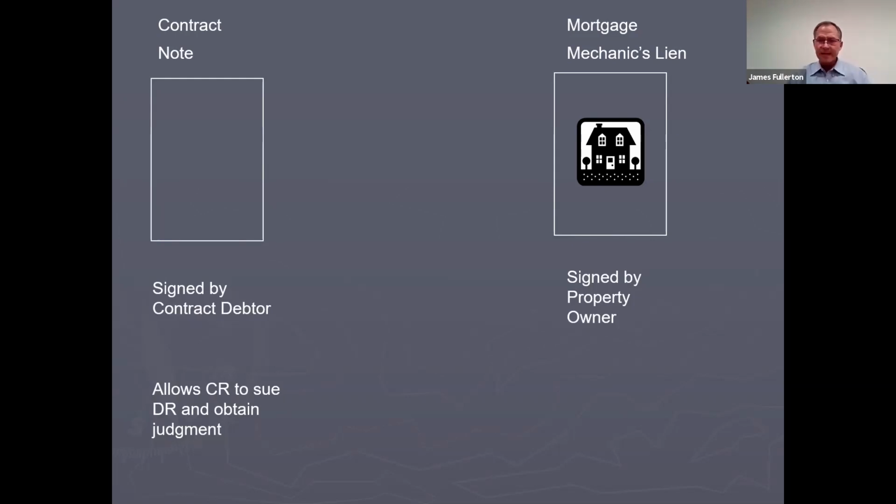We file the mechanics lien, telephone rings, somebody wants to send us money to get rid of our mechanics lien. That's because everybody in the contract tiers has enough money and is solvent that the contract debtor can be forced to pay. You know, the owner or the general contractor is holding money on the contract debtor, and they will send that money to the claimant in order to eliminate the mechanics lien. Okay, that's how security works.